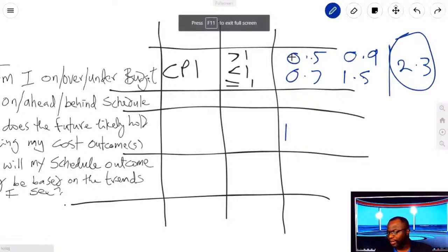One of the ways you can claim earned value is by planning out what you need to do over a particular time period and taking account for the hours you work, like in a service contract. So that's how management knew there's definitely something up. This is a level of effort, and there's no way we could have been that good in terms of our CPI.